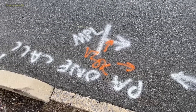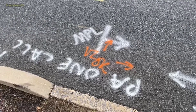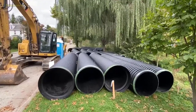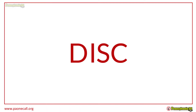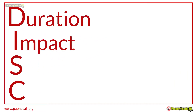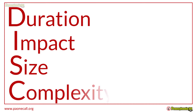It's important that we coordinate our effort with all stakeholders so that we cause minimal disruption. To determine if a project is complex and should be entered into CPA, we use the acronym DISC. It stands for Duration, Impact, Size, and Complexity. Any project meeting one or more of these criteria may benefit from being entered into CPA and going through the process we're outlining today.